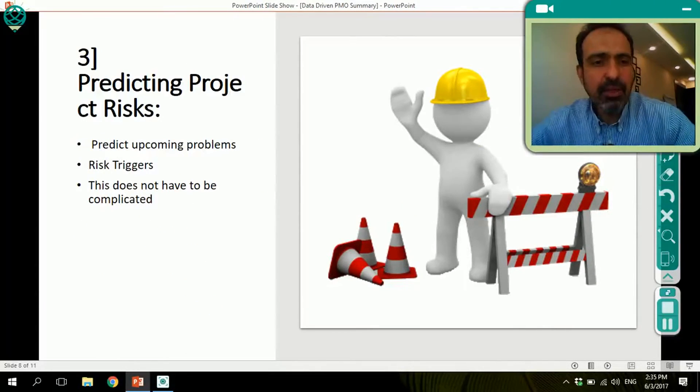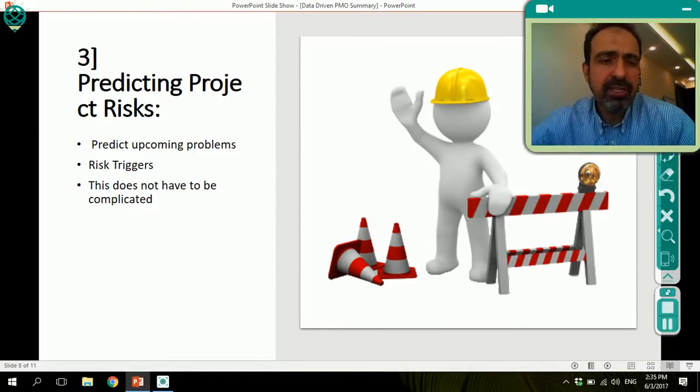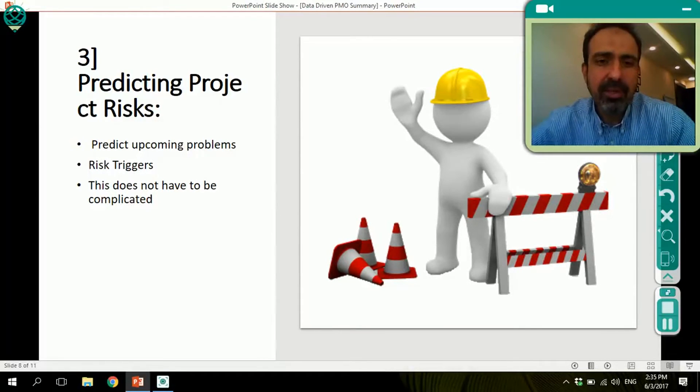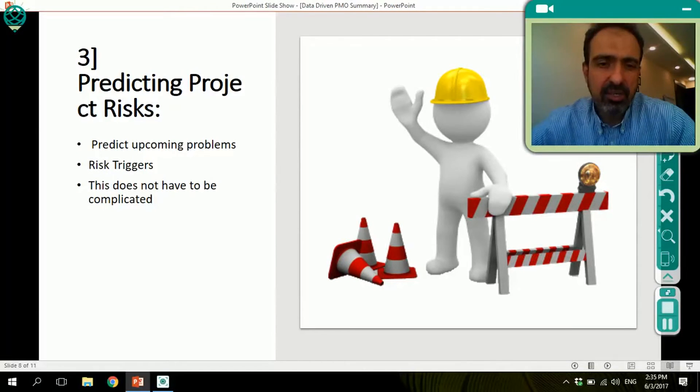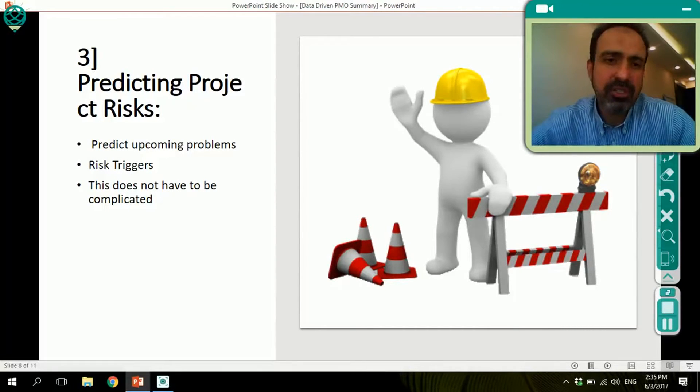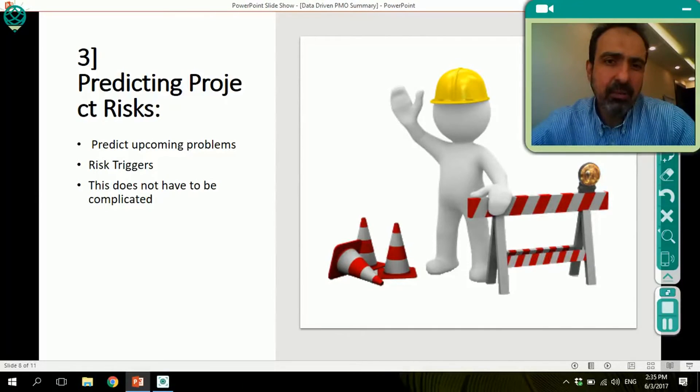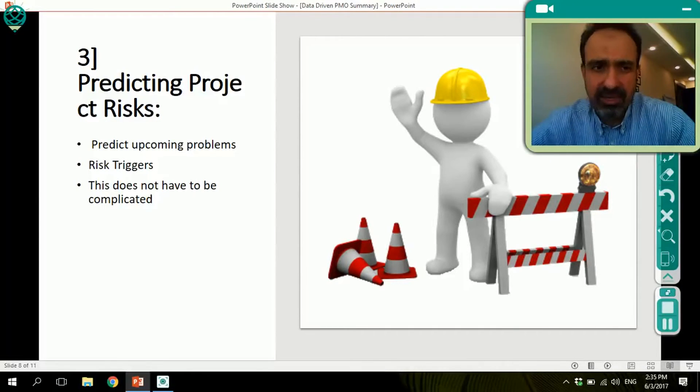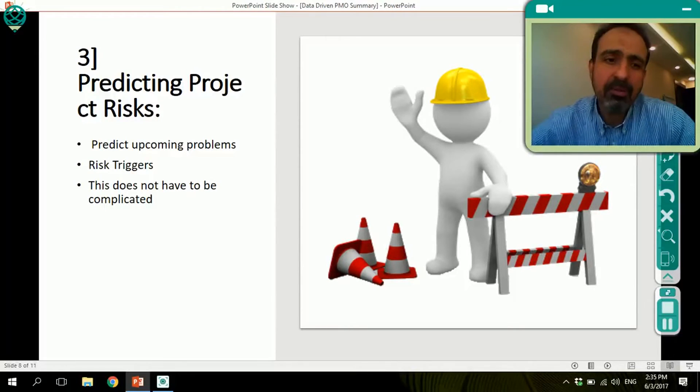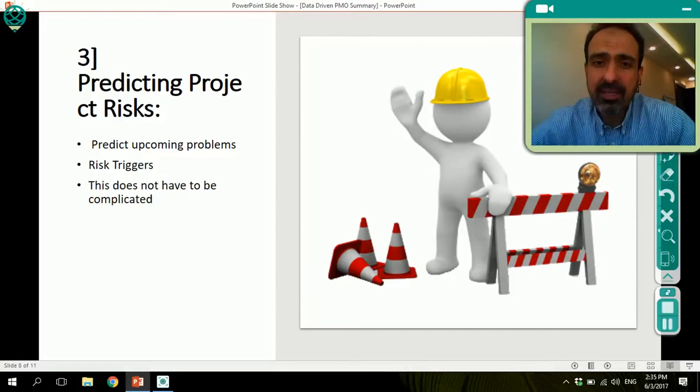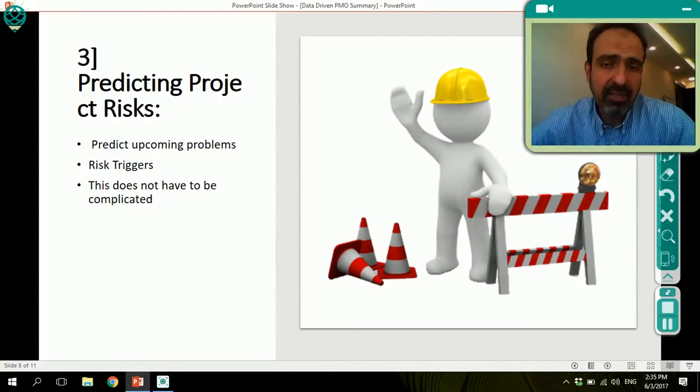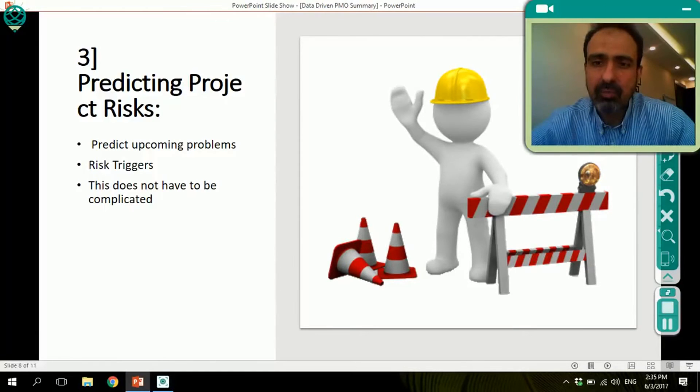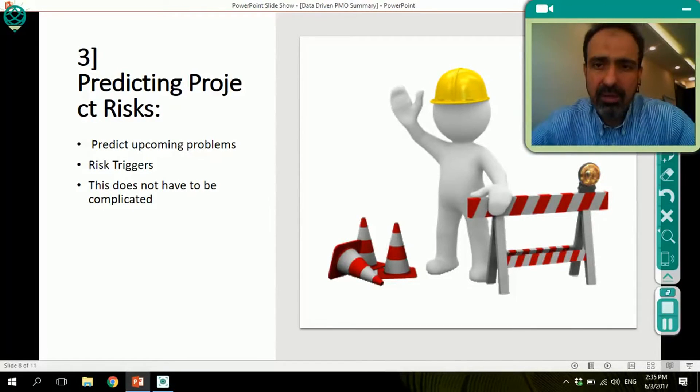The third thing we can use data analytics for is predicting project risks. Looking at previous patterns of project risk and how risk happens, we can identify certain risk triggers that occurred on previous projects before certain risks happened. And from these triggers, being able to identify this is easier today with data analytics. Identifying these risk triggers will help us predict upcoming problems on our current projects. And again, this with the current availability of tools, it's not that difficult or complicated. It requires a data scientist to work with you, somebody who understands data architecture, but other than that, it is really doable.